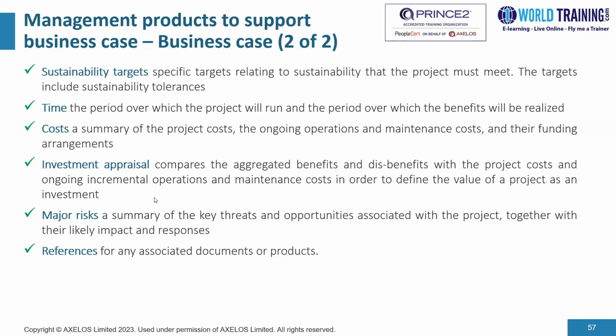It would include investment appraisals, comparing the aggregated benefits and disbenefits with the project costs and ongoing incremental operations and maintenance costs in order to define the value of a project as an investment. Now, a few examples of appraisal techniques would be net present value, payback period, internal rate of return, and so on. And depending upon the needs of the project, we could pick and choose an appraisal technique that would be